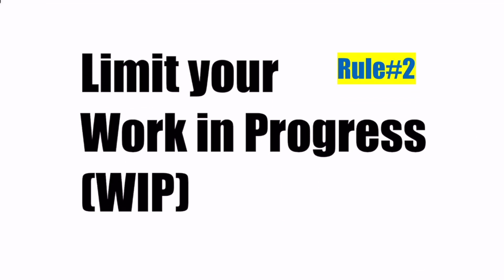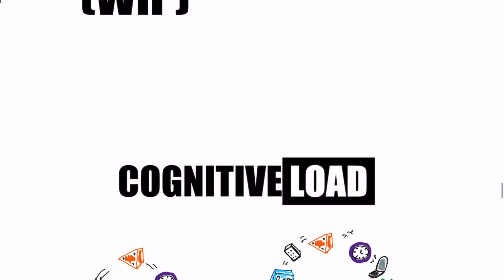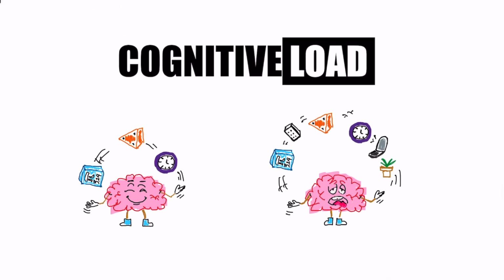Pay attention to how many things are in your in progress column, and don't just pull things into it whenever you want. Why? There are many reasons, but I would just focus on 3. The first is cognitive load. Imagine running a session where your players split the party 4 separate ways, and you decided to run them in parallel. In the narrative, the events might be happening simultaneously, but only one scene can happen at a time here in the real world, and so you would be switching back and forth.